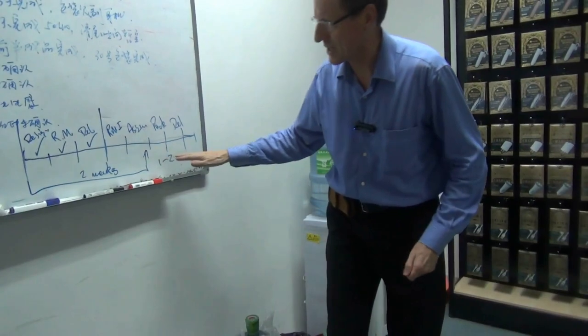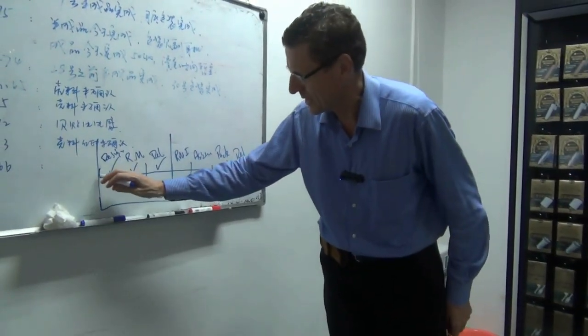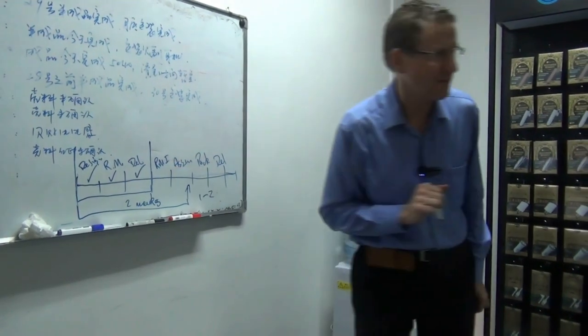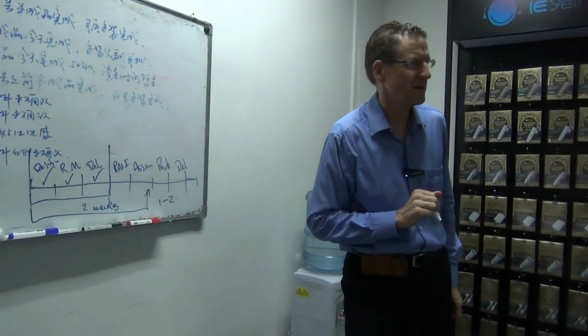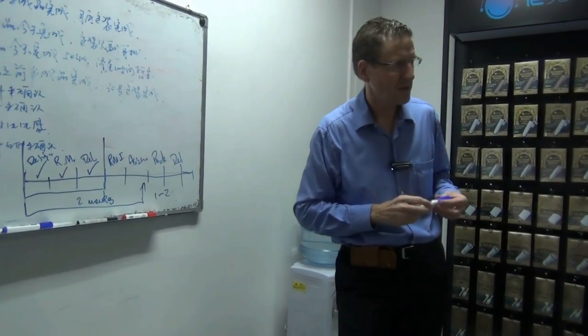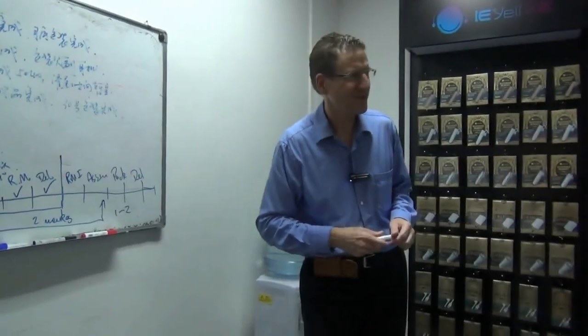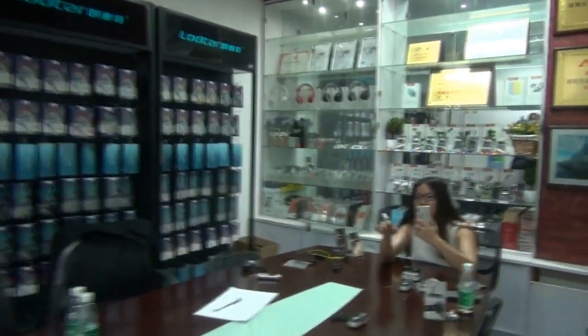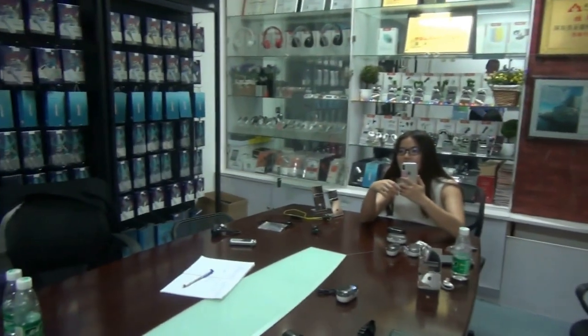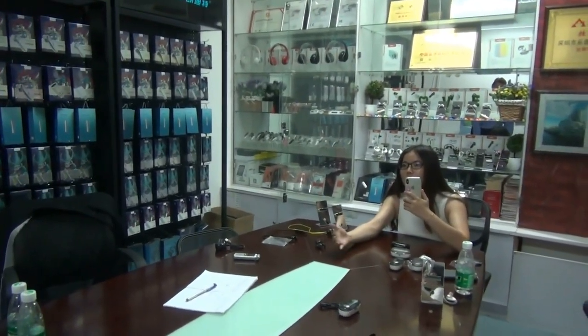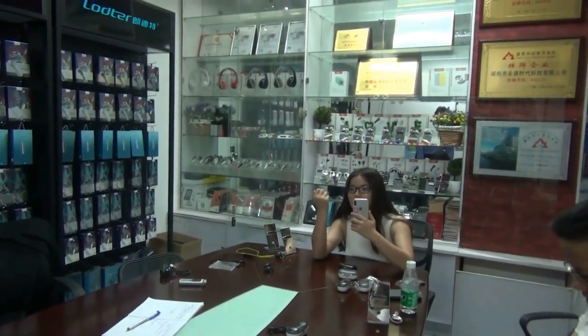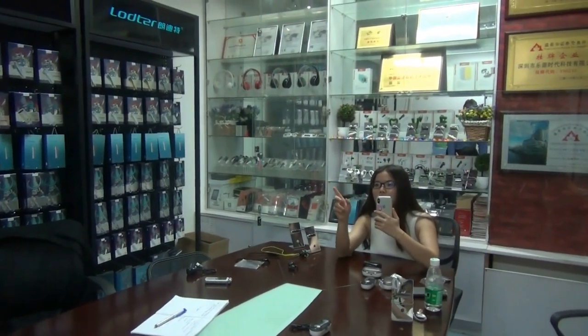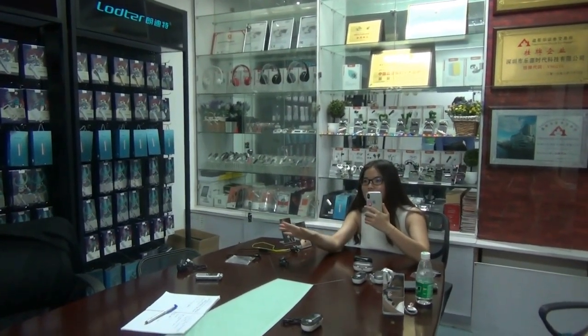You are promising your customer with the assumption that you know exactly how long this process is going to take, but you don't. We already negotiated with our customers and there would be a period like mostly 30 to 35 days for the lead time. The progress is that as we collect all the raw materials around 25 days, so basically there are 10 days for us to proceed the mass production. So if one of the raw materials has problems, it will delay all of it.